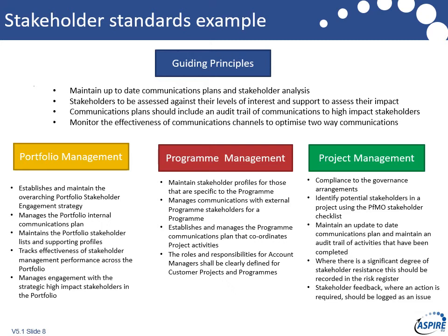So you don't want your projects firing off at all sorts of press agencies and things. You want the program to control that. So that's why the program should deal with all external comms. Projects can deal with their own teams and their own stakeholders, but not outside, because the program needs control, because you may have multiple messages that you want to communicate in a certain order from projects. Then you have an aggregated comms plan that covers the project, and roles and responsibilities are clear for different types of projects. Maybe you've got account managers involved. So that's the kind of thing we need to be looking at. And of course, you can see the project ones, portfolio ones, they're all covered in our course. So that's really what stakeholder standards are all about.